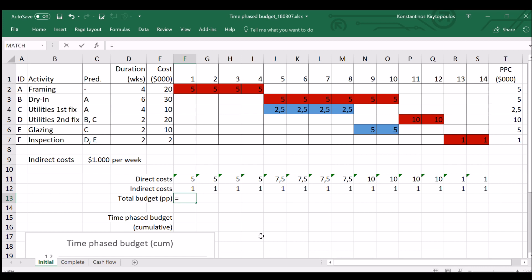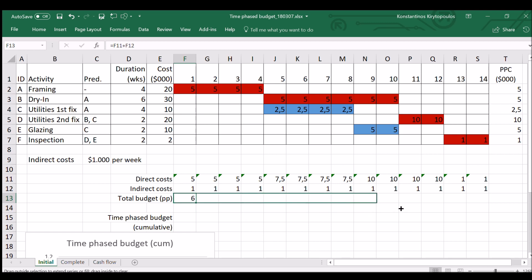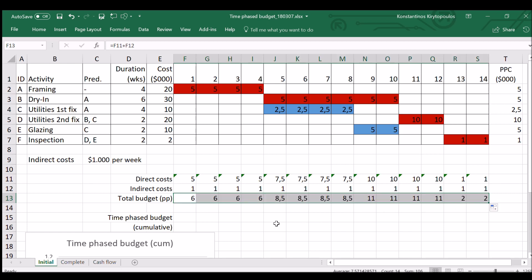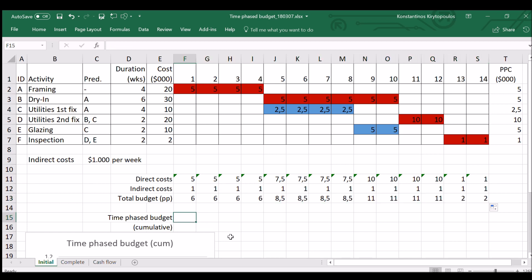So that would be the money that we are supposed to spend for each week of the project execution. The time-phased budget is exactly that. It's this profile of money expenses for the completion of the work for each period, as per the schedule, as per the planned schedule.